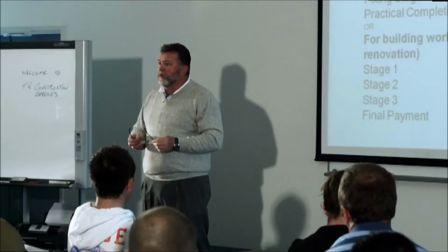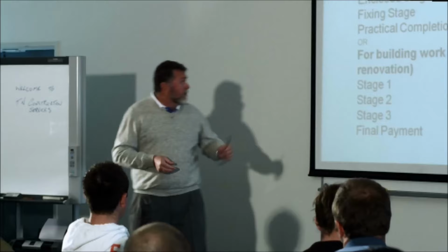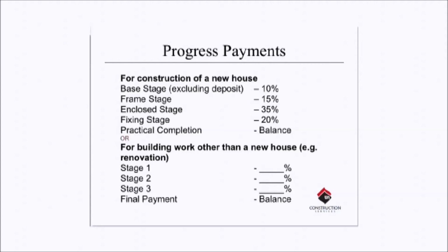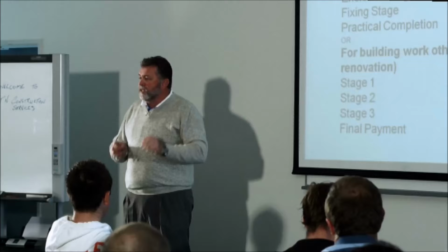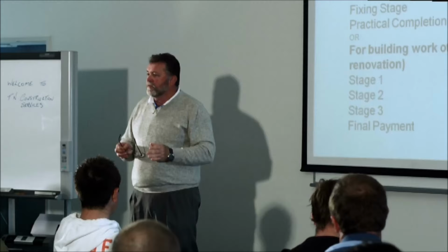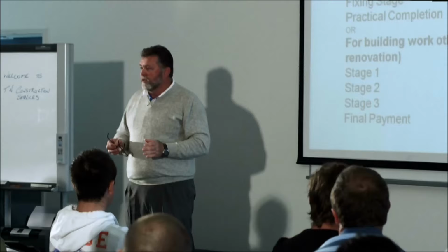And the profit part comes at the end. Now, the practical completion payment is not a progress claim. It is the practical completion claim. It stands alone at the very end. If you read your conditions of contract, you'll see there are clear guidelines on obligations on both parties at practical completion. So please, I beg of you, please read those conditions.